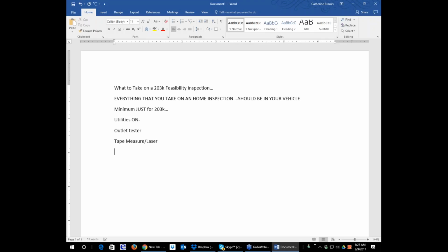You always want to have, and these are at the minimum, your digital camera with the ability to record audio. You want to be recording the entire audio of the meeting as well as the photographs, because you don't have to complete the report on site. If you're not comfortable completing reports off site and you get out of the flow of taking notes on paper, then you can record the audio of what you discussed with the client, and with that plus your photos, you can create your report. I love doing this because I have my phone out to take pictures anyway.